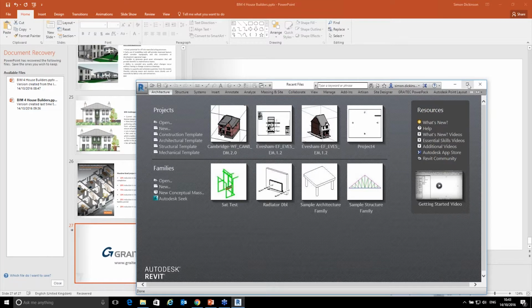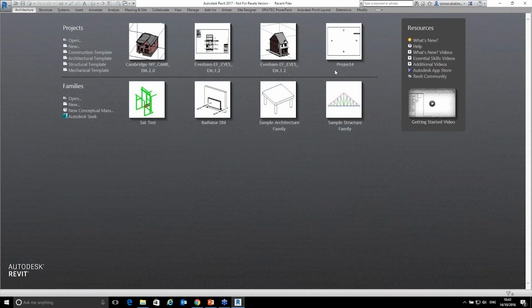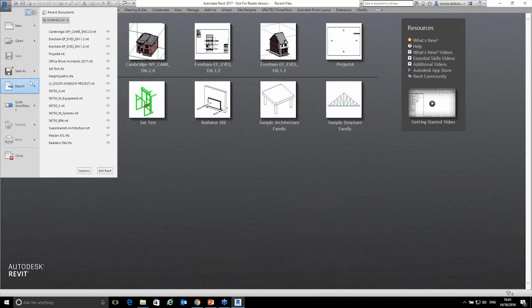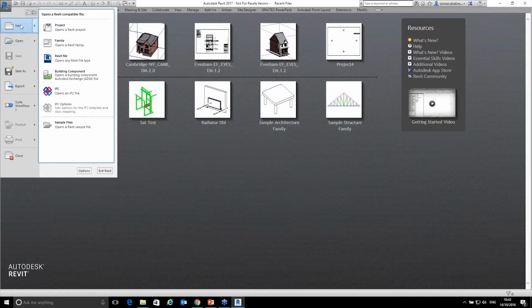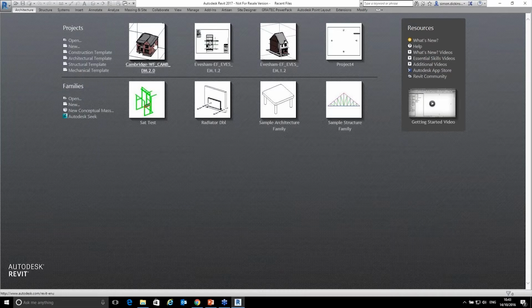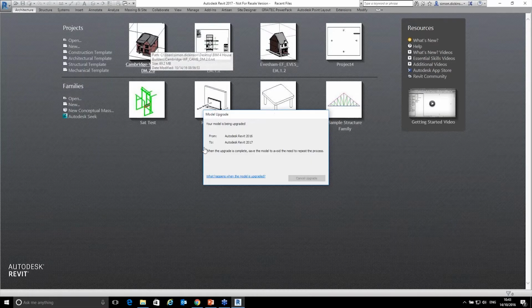10% reduction in time on site, yeah? So basically this was fabbed, so prefabrication was done, so we actually were very easy to reduce that time on site. 25% reduction in notified defects. Again, we understand exactly how that building is going together. We can see it in 3D. We know that the kitchen cabinets are going to fit even though it was the first time it was designed because everyone's got involved, yeah?